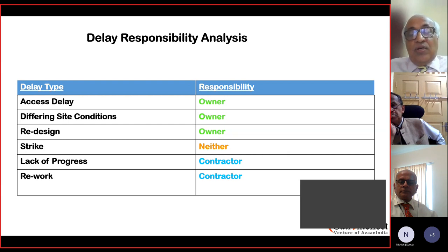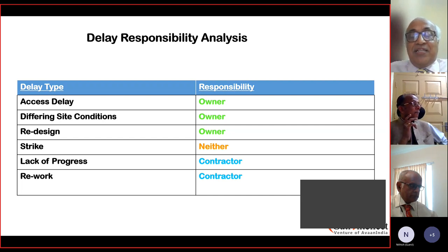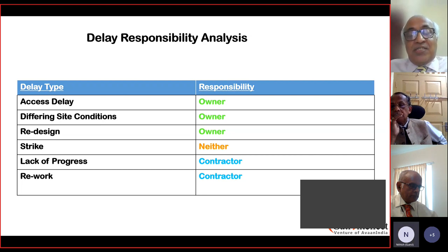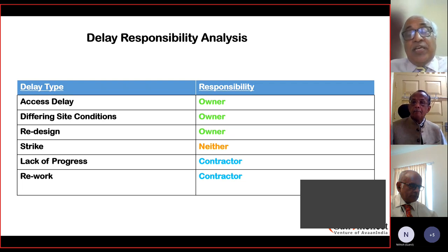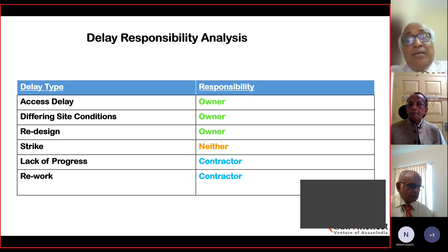Typically, in any construction work, the owners don't supply the cement and steel and ask them to do just the labor job. The contractor procures the cement, steel, and all the mud and other items and does the work. Now, suppose he can prove to the steel supplier that this defect is because of the defective steel, he can claim it from his supplier and say, supply me the steel free of cost. He can do that. But the main owner is still eligible to get this from the contractor.